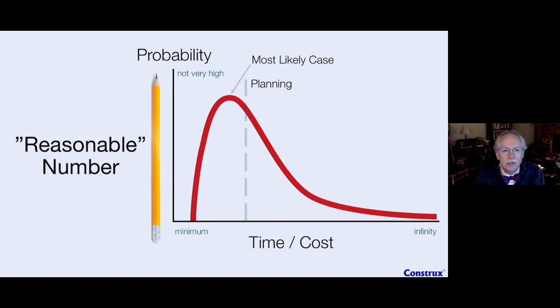What we want to do is use the planning number to track again. It's going to say, okay, no, we need to be done by this date with this piece of work. And they're going to go, wah! But you have to understand that we know that we're equally likely to go over as to be under. So we're not going to be holding you really hard to that date, but we're going to be constantly questioning you, asking you questions. And when you go over, we're going to understand why, so we can improve things in the future and come up with better planning numbers, right? But this is what we're going to do, because if we keep to this planning number, that means we have high confidence we'll deliver on our promise. So we track to the planning and we go to the promise as we move to the promise.